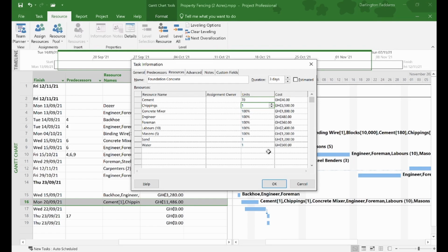If let's say the substructure, if we don't need more hands, that is why the laborers, they have to be listed individually. So you pick them one by one. If not, we will have issues with the cost. So if there are 5, then we have to list them one by one. So you can say mason 1, mason 2, mason 3, mason 4, mason 5. If you know their names, write their names. So that if that side you need 2, you just select the 2 you need. Exactly.